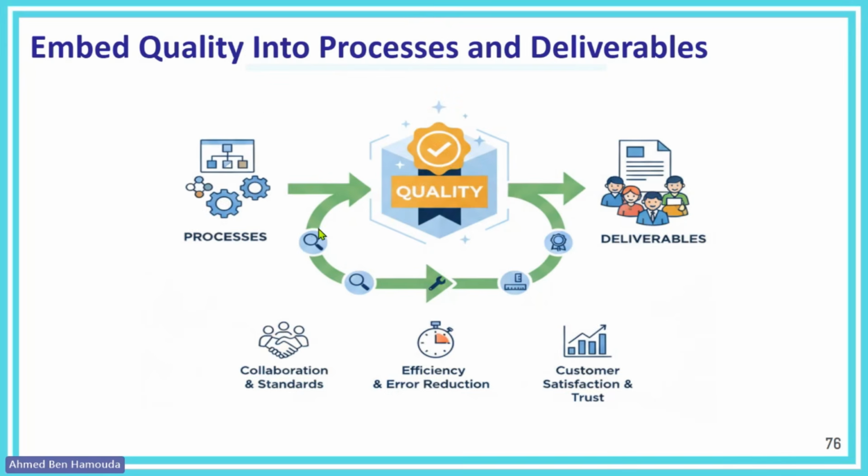What they care about is your processes, your compliance, your documentation, your configuration management plan, your change management plan. So that's why it's now very important to embed process quality into the project early enough to guarantee that your project is compliant and gets the pass.